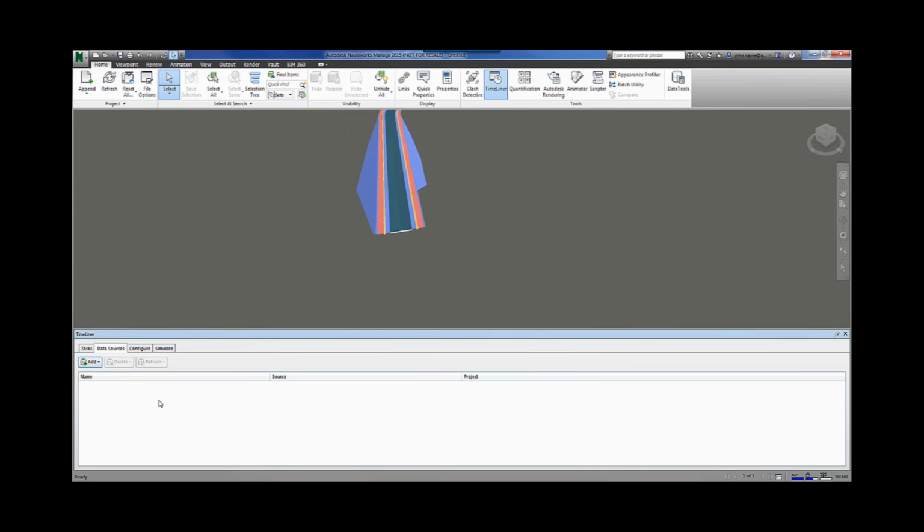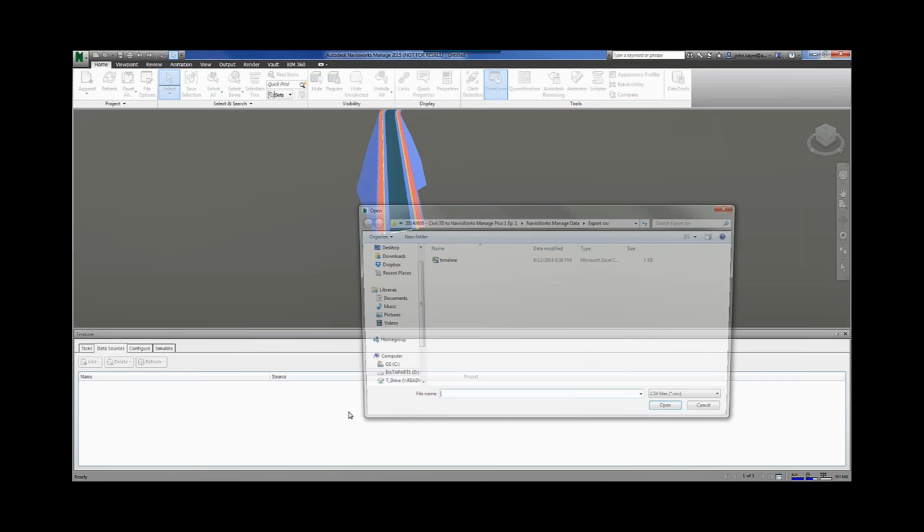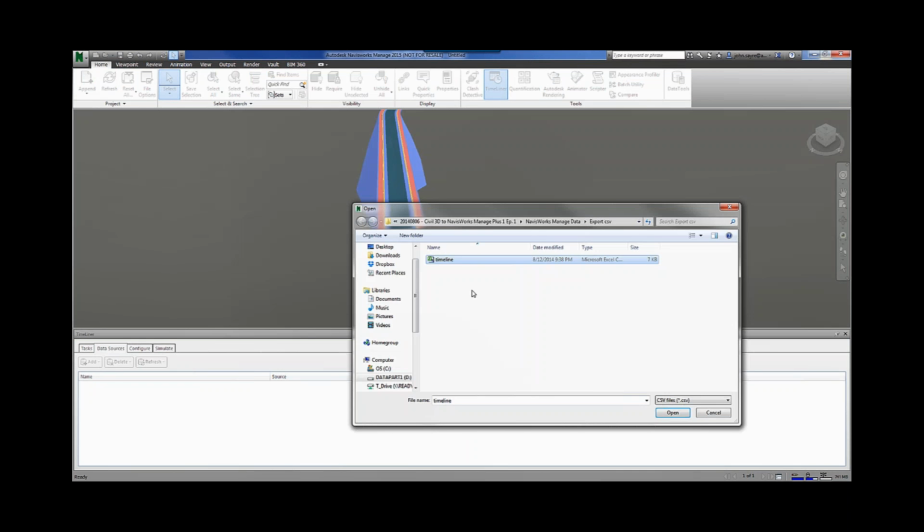So here in the data sources tab, we can go in and start adding in that schedule we're taking in. So here it is. There's Primavera and there's the Microsoft. Obviously, it can just be an Excel file as well. So there's the CSV import that's there. We're just going to use a CSV import from this for this time.